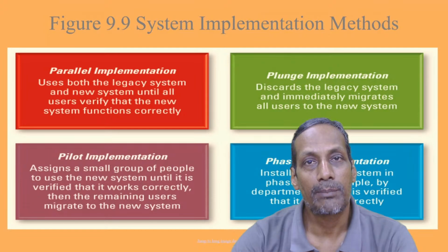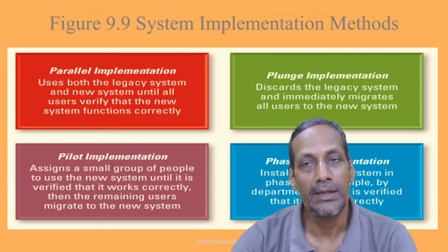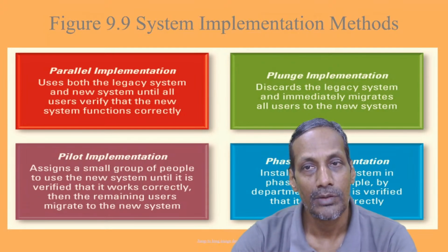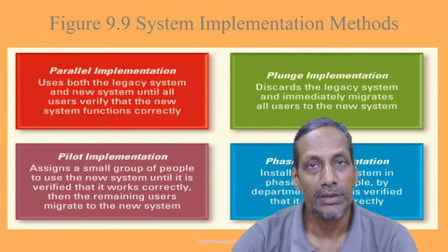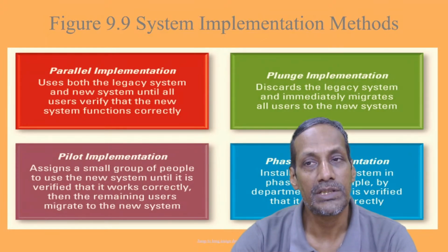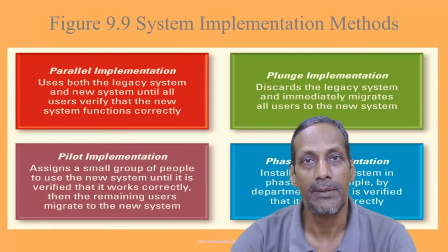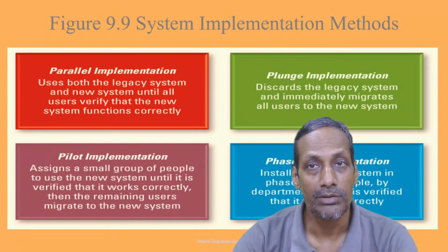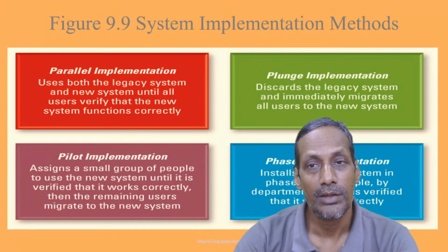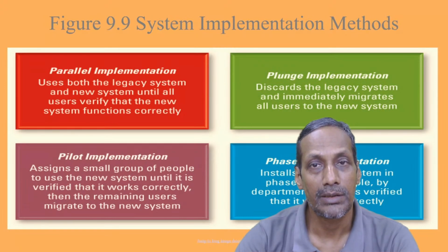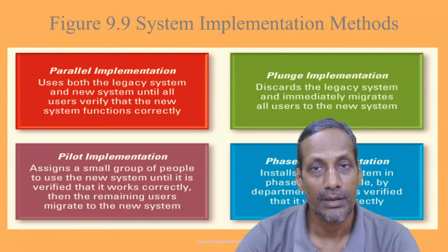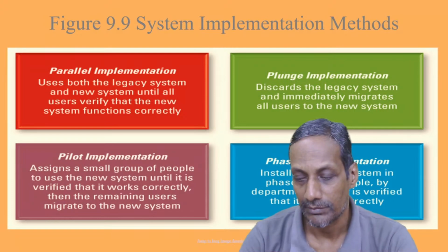Or you can plunge into an entirely new method called the plunge implementation method to quickly implement the designed solution. This is an implementation method which discards the legacy systems and immediately migrates all users to the new system. This methodology is followed only when you don't have the time to come up with the implementation of the new solution.